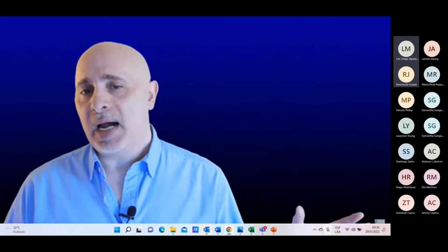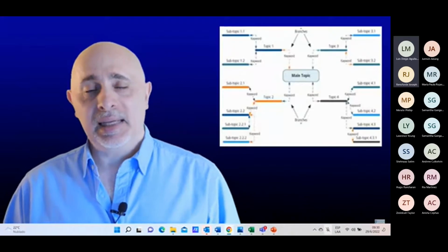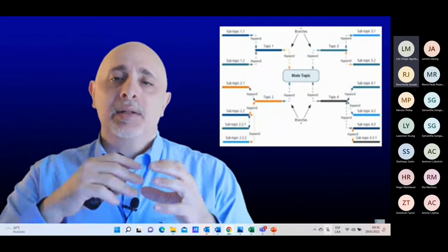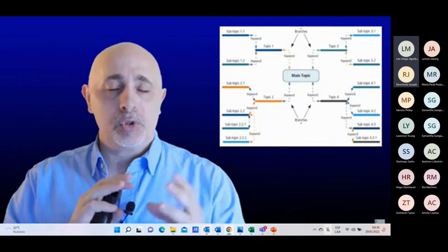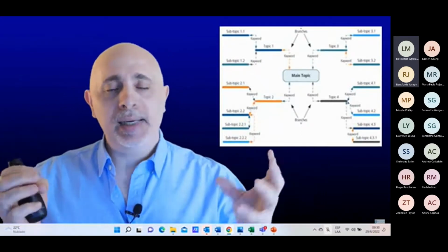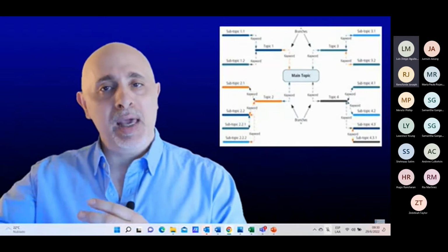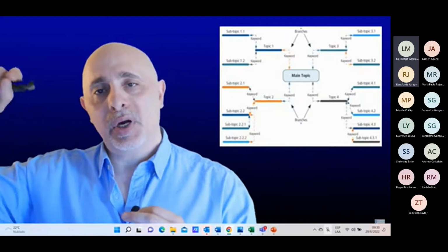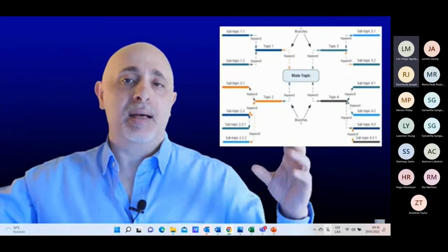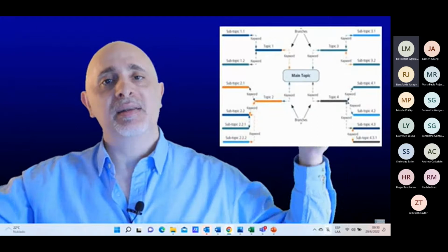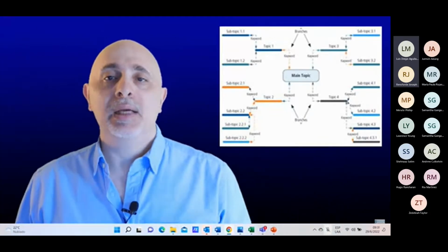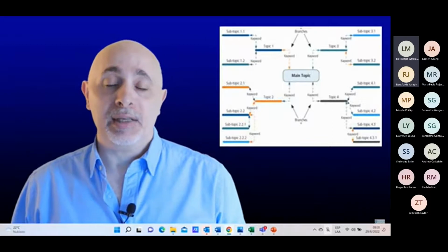You could also use a mind map. What a mind map does is it starts from the heart of the project and starts to branch out different categories of stakeholders. So you might say internal, external, right? And then from internal you could go to management, then you go to staff, and then from management you can branch out to different departments. And at some point you would identify specific people at the end of those branches or map that would be stakeholders in your own initiative.